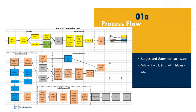When an RFQ is received, a quote is generated by your sales territory manager. Any quote generated under $250,000 goes under internal review to give you the best price and help get the job awarded to you. Once we receive a new order, it gets acknowledged within 48 hours — you'll get an email thanking you for your order, and a PM will be assigned and will reach out within 48 hours. A job file is then created with the P&L budget and quote.